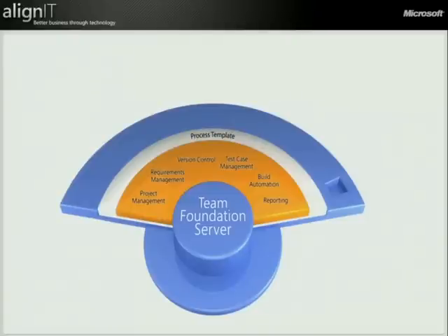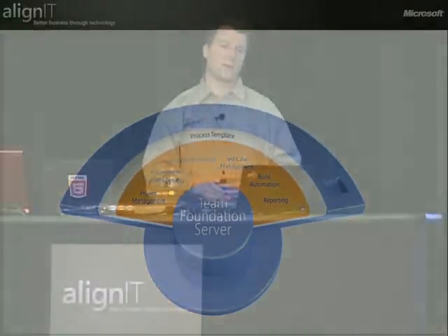Reporting is one that I think a lot of us care about because it gives us visibility into what's happening in the project. A lot of this stuff is done for you automatically. So in addition to Team Foundation Server and the integration with SharePoint, we also provide Reporting Server as part of SQL Server so that you can get really nice reports generated to show you things like velocity of your projects, the burn down rate, things of that nature that give you that visibility to make calls ahead of time, saying yes, we're on time, or yes, we're going to achieve what we've set out to achieve, or no, we're not going to achieve this, or we need to allocate more resources to this particular iteration. These and other questions you can answer with the data that we provide through these types of reports.